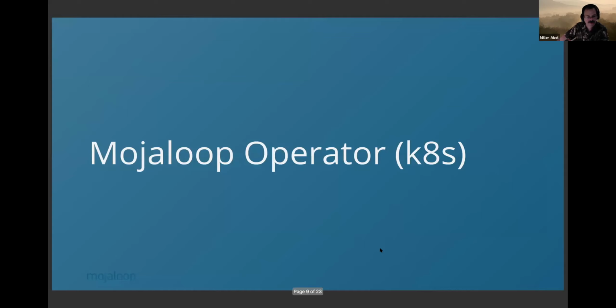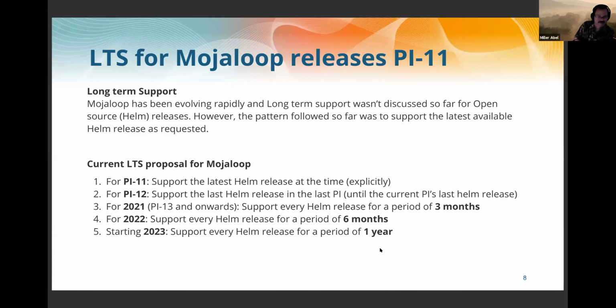Sam, quickly before you proceed, I wanted to make sure that we understood that LTS is long-term support, meaning that as they are deployed, there is active support from the OSS community to correct problems that emerge. Those problems may emerge in later releases and then may require backfitting to those prior releases. And so this represents a resource commitment of the Mojaloop Foundation and its community.